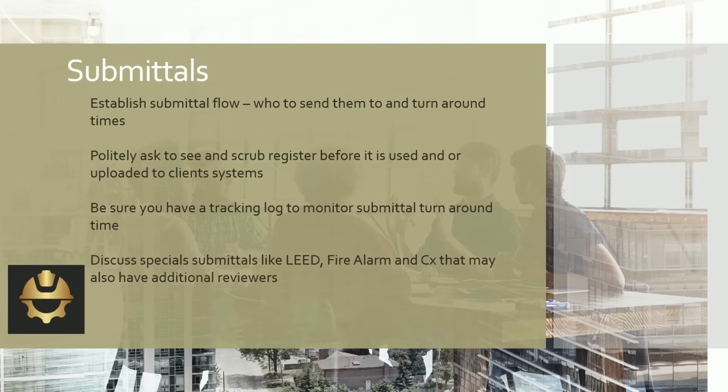They put that register in their QCS RMS system. You need to scrub it before it goes in. Once it's in somebody's system, whether it's a Prolog or a QCS RMS or some kind of Access database, believe me, we've seen them all. Whatever software your client's using, before it's uploaded, that's when you've got to have it scrubbed. Once it's uploaded, it's going to cost you time and your employer money to get them out of there.